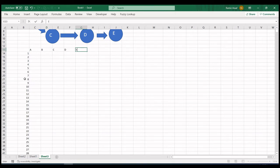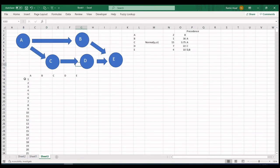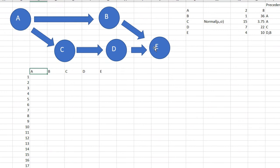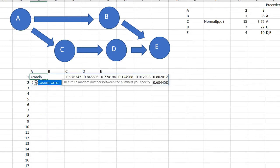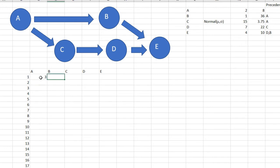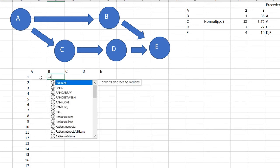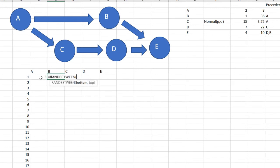For A, B, D, and E I'm going to use a function called RANDBETWEEN. RANDBETWEEN 1 and 8 for A, and this is RANDBETWEEN 1 and 36 for B.